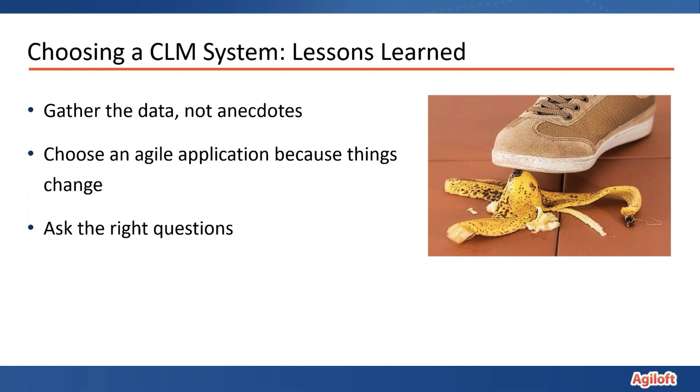And then you can take the time to figure out what your workflows should be and add those in. Or maybe you start with one particular group. Maybe you've got a business unit that has a pretty good process in place. They don't have a lot of outliers. Maybe they act as your model for what your contracting process can and should be. And you implement it with them first, and then build it out as you bring in other groups.